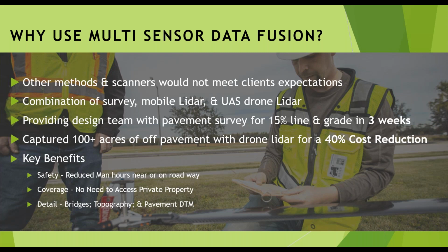Now, not due to technology limitations, but due to regulatory limitations, this project actually created some additional challenges. Anybody that's familiar with this route knows it is right off the approach runway for Orlando International Airport, which was going to be a challenge for using UAS there, but we were able to work through the system, decide safe flying heights, and make sure we were in regulatory compliance.